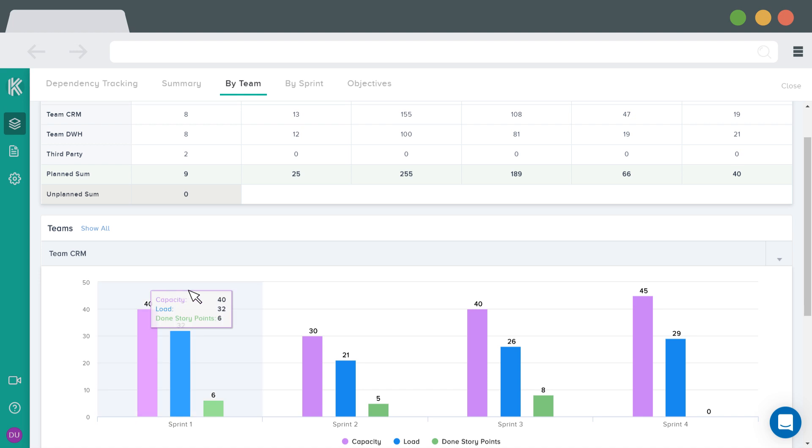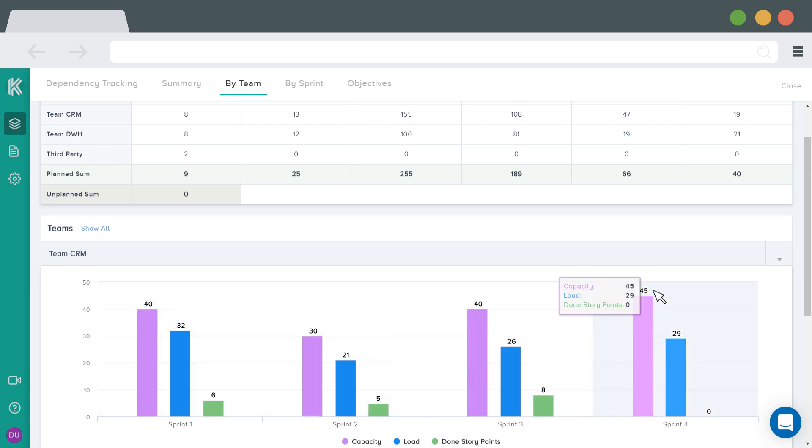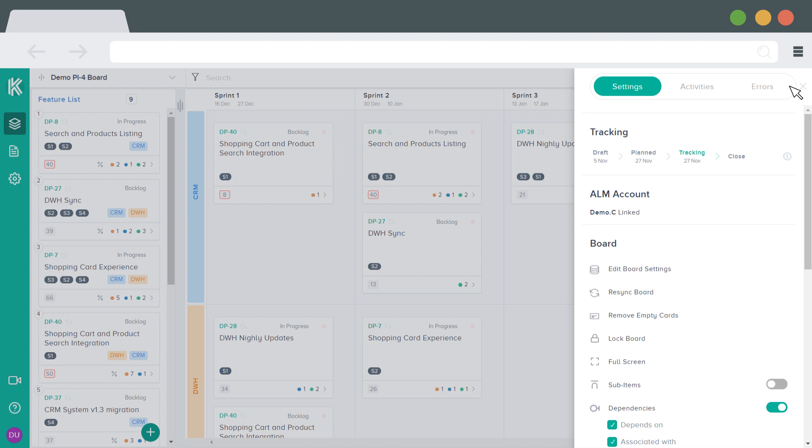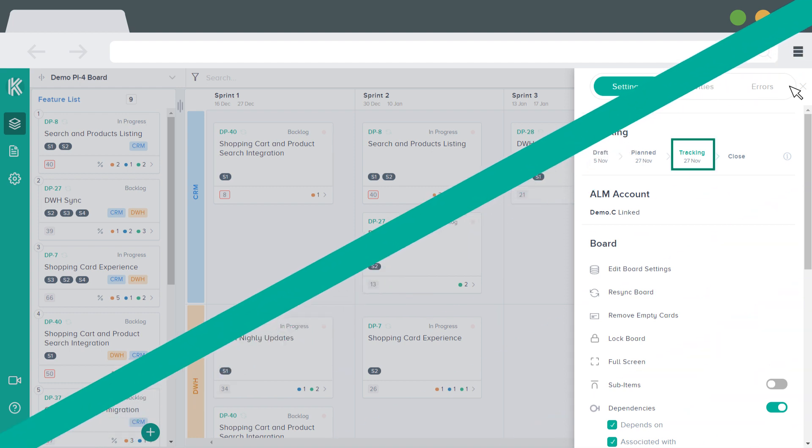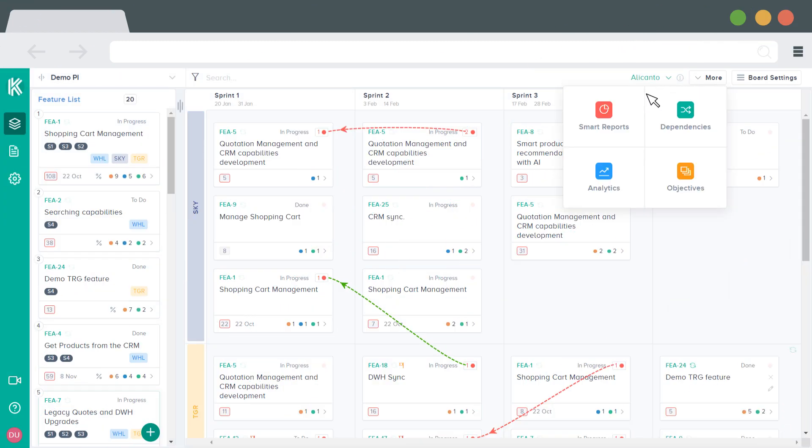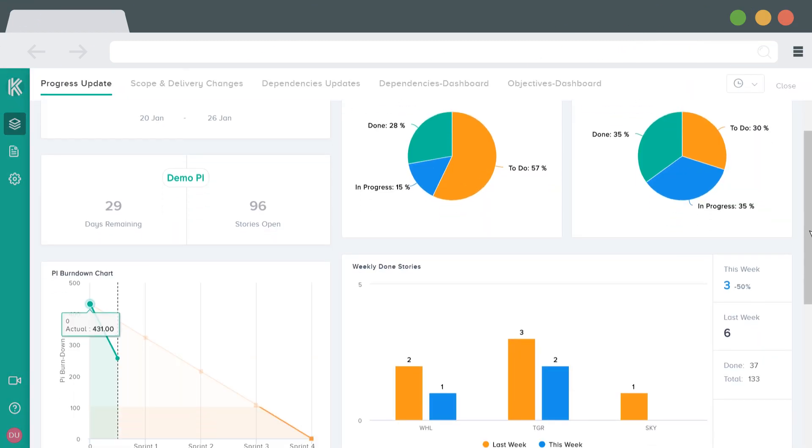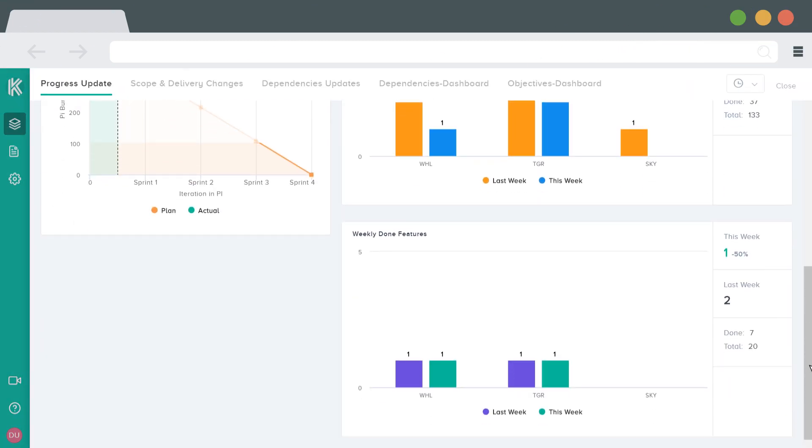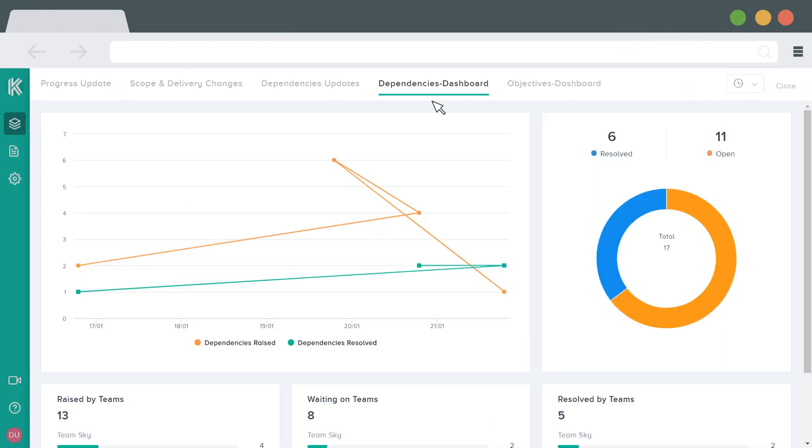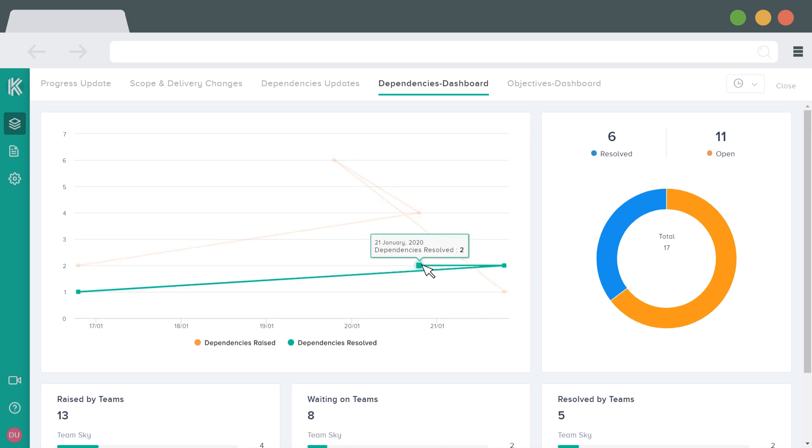Analytics in Kendis will highlight if teams have planned more than their capacity. Once the PI planning is completed, change the board state to tracking. With Kendis, you can track progress of your features and stories. See how many dependencies are still open and identify bottlenecks.